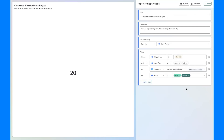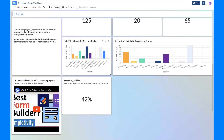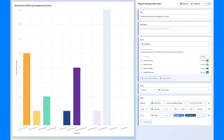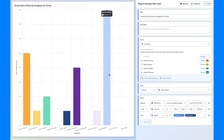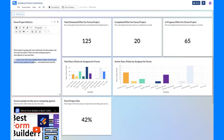You can break the row filter down to anywhere in the hierarchy of data — whether your data has a structured field indicating which project it belongs to, or you're using this synthetic filtering approach to narrow down exactly what you need. We've also created a burndown-style view showing total story points, completed, and in-progress counts. The active story points by assignee chart — filtered to in-progress statuses and task-level issue types, grouped by assignee — makes it easy to see that Sam is working on 40 active story points right now. That's clearly a risk, and we can call that out in the text block on the left, combining the narrative with the data.